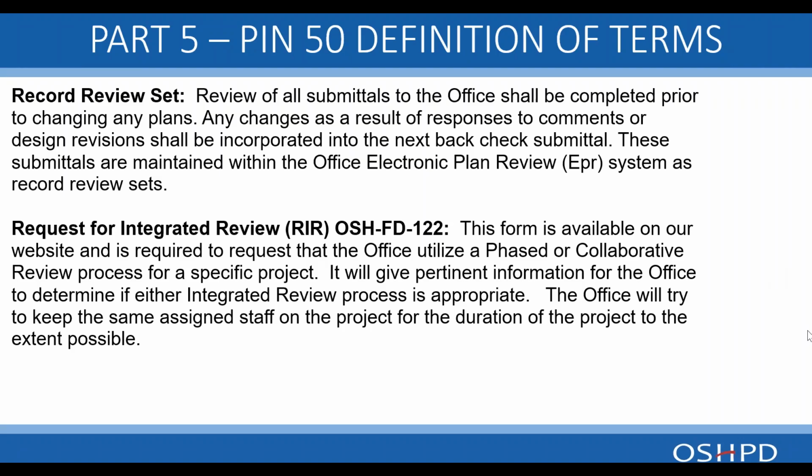A record review set. Review of all submittals to the OSHPD office shall be completed prior to changing any plans. Any changes as a result of responses to comments or design revisions shall be incorporated into the next back-check submittal. These submittals are maintained within the Office Electronic Plan Review, EPR, system as record review sets.